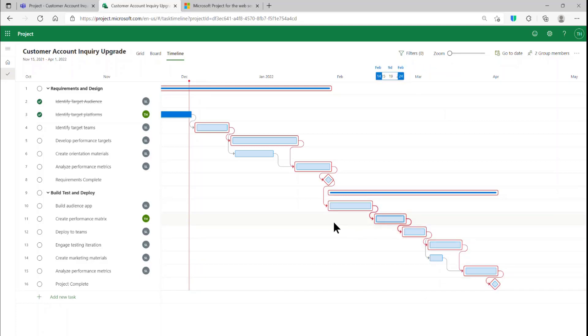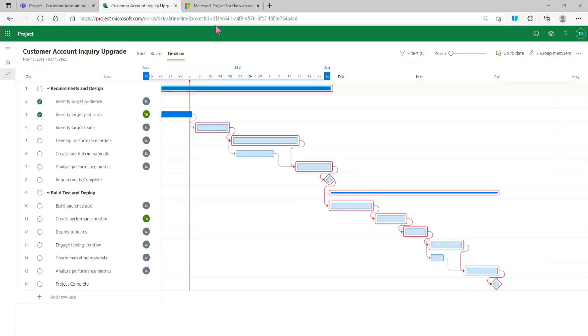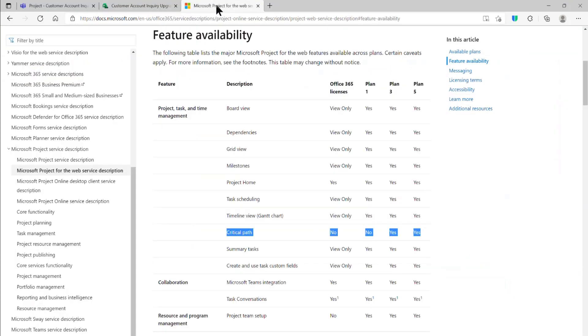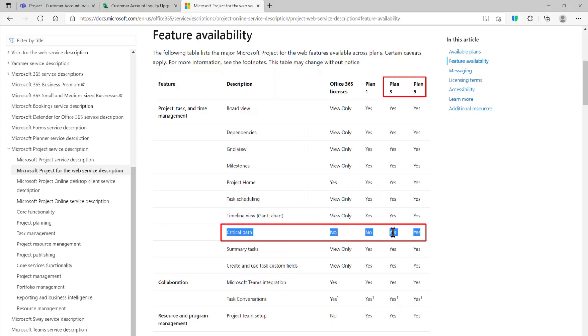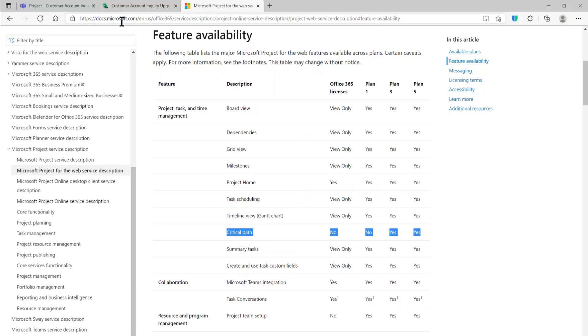Now, one important note on licensing. The Critical Path feature is available only to Project Plan 3 and Project Plan 5 license holders. So go ahead and click on the link in the blog to verify this information on the project service description.